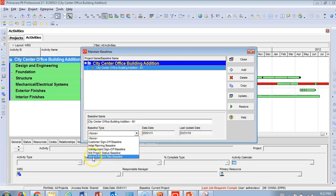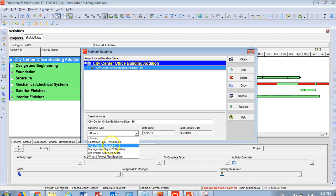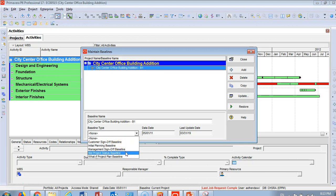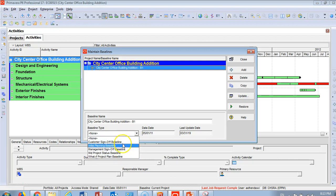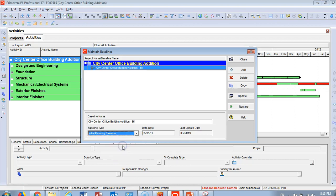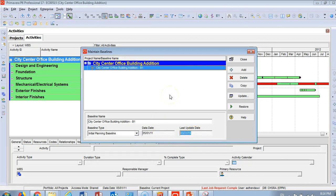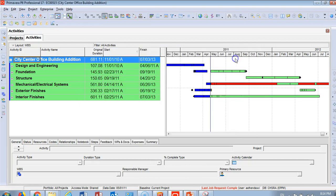Go down here and you'll find City Center Office Addition dash B1. For baseline type, you'll find many options: customer sign-off baseline, initial planning, management sign-off, mid-project baseline, whatever you want. I'm going to choose initial baseline. You'll find the data date and last update. What am I going to do? Close.